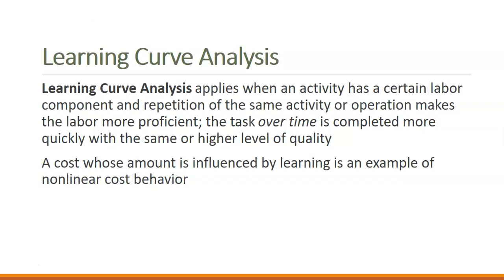The next thing that we're going to talk about in Chapter 8 is learning curve analysis. Learning curve analysis applies when we have repetition of the same activity or operation. The theory believes that the more we repeat an activity, the better we get at it. So over time, we become more efficient, and we can do the task more quickly with a higher level of quality.